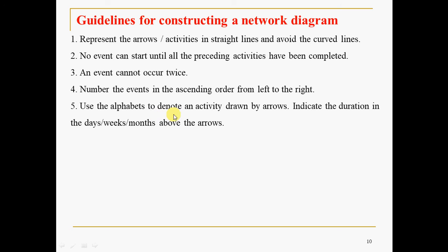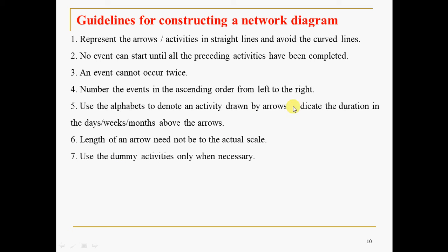Use the alphabets to denote the activity, drawn by arrows, of course. Indicate the duration in days or weeks or months above the arrows. Length of an arrow need not be to the actual scale. It is only a proportional diagram. We are discussing the construction of a network diagram. These are a few guidelines that you have to follow.